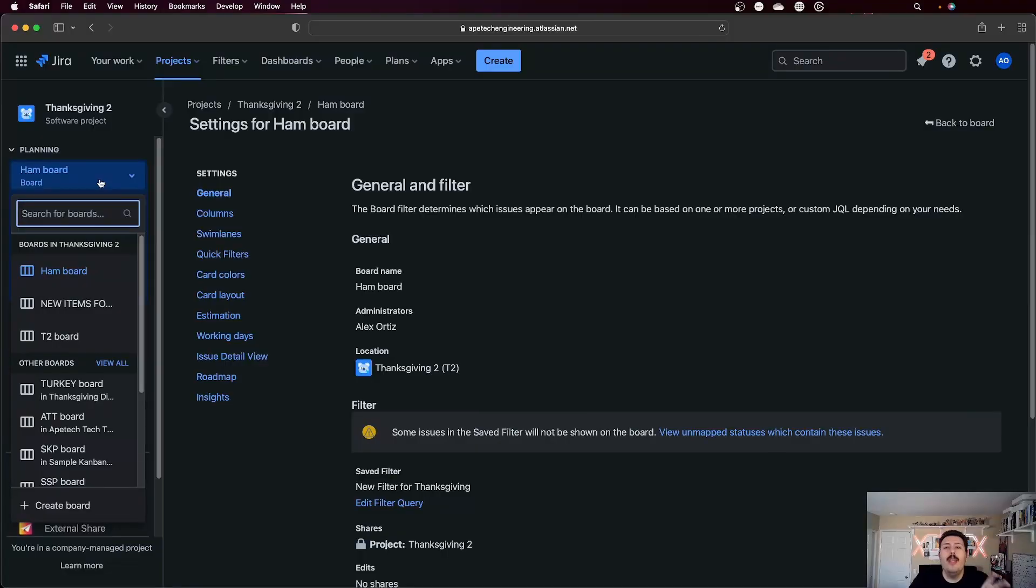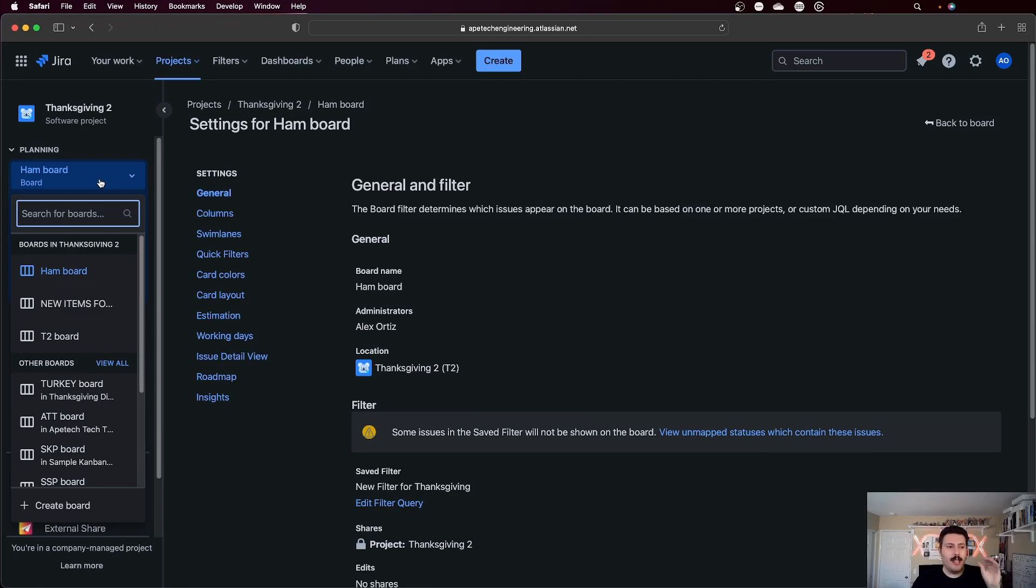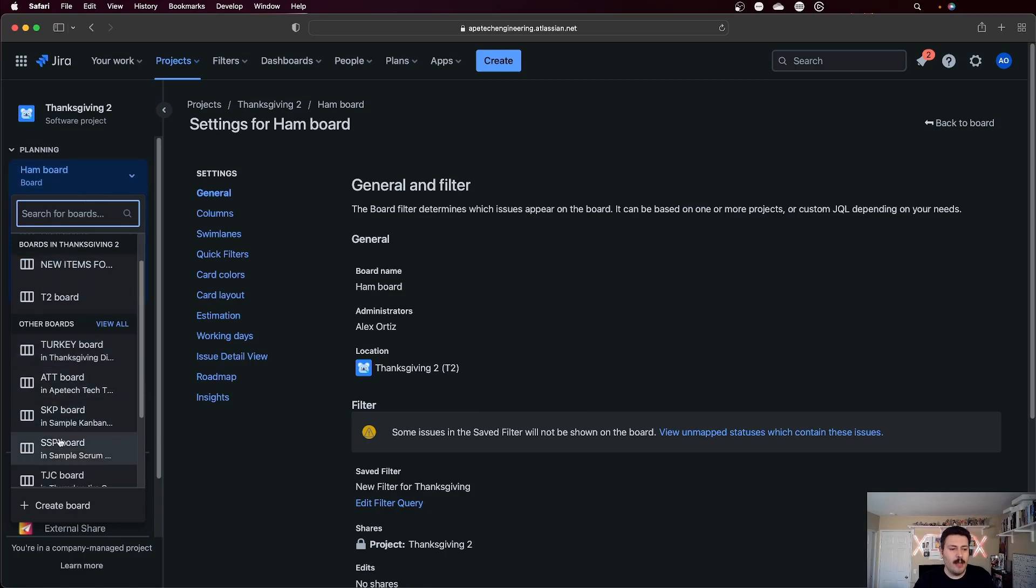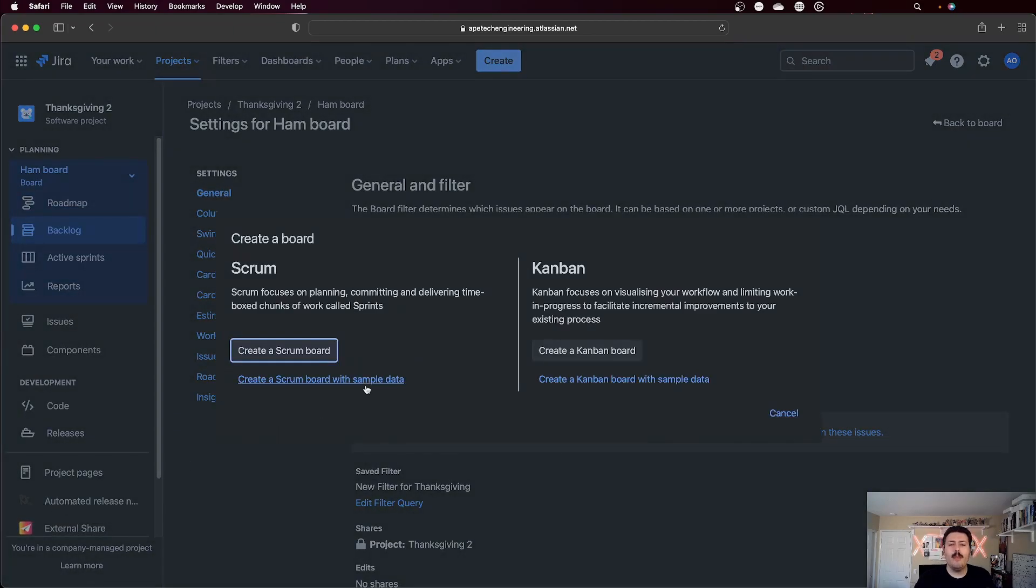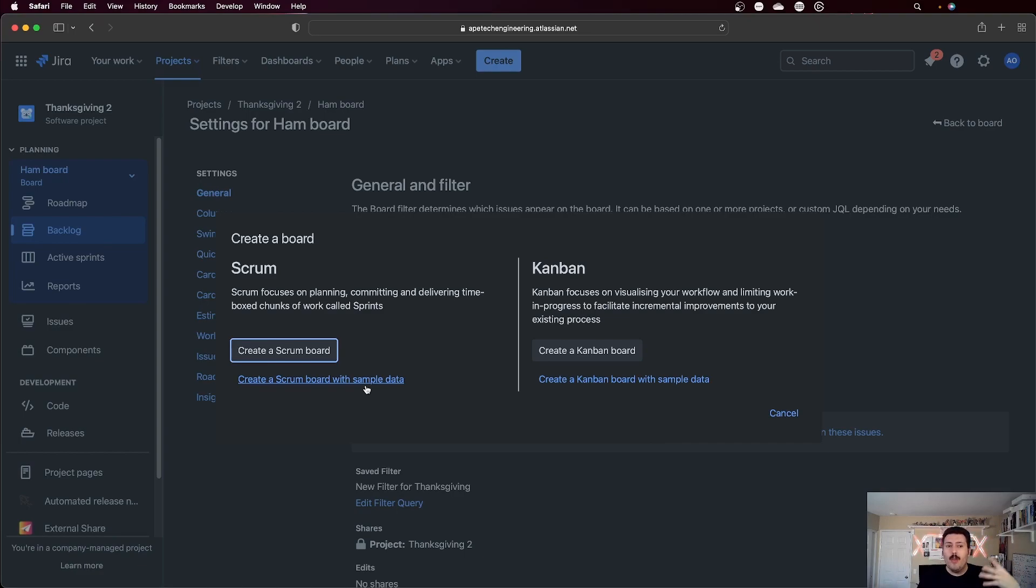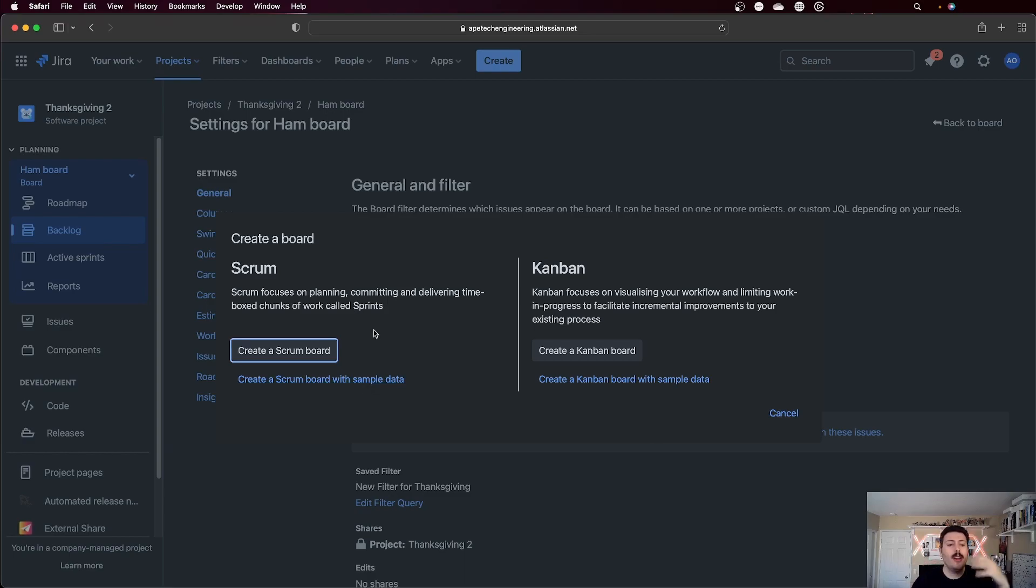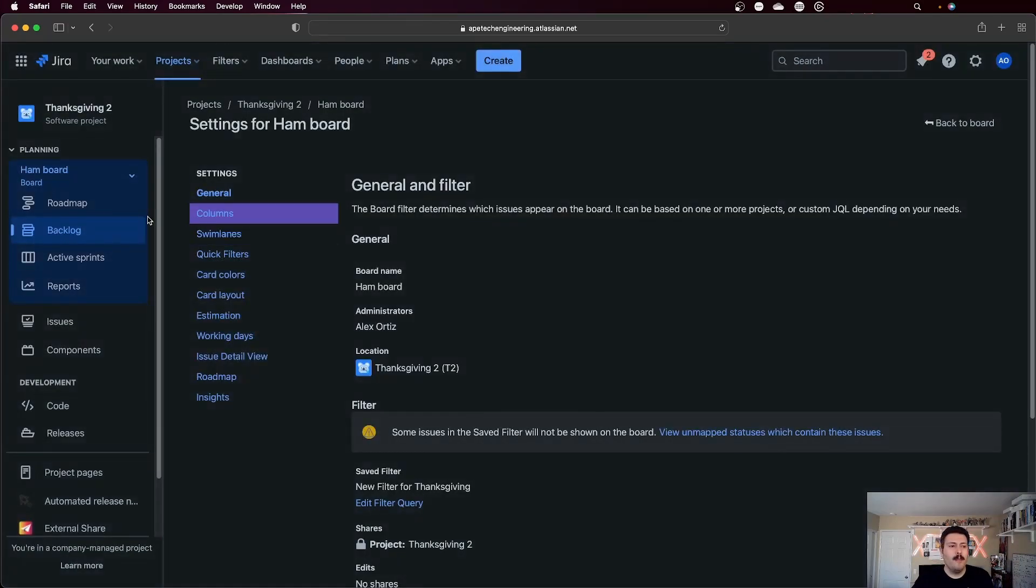So how do we do this? How do we give you this amazing all in one view? Well, it all starts with your filter queries. When you come into your Jira project, it's actually really easy to create multiple boards because anybody can basically come to the board here, whatever name of your board is, and you can come down to the bottom and hit the create board. At that point, you can pick whether it's scrum or Kanban. And the cool thing here is that it doesn't matter what you originally picked. A Jira project can have Kanbans and scrum ones. It can have a mix. It doesn't have to be one-to-one. So you can create your own board here and you basically create boards.